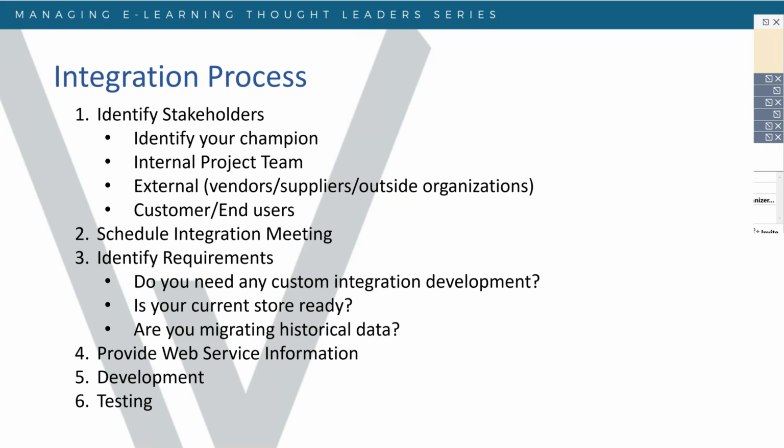So, identifying the requirements. Why is this important, Chris? This is very critical, especially for involving your AMS vendor. We understand your database and your membership processes, and there may be something on the technical side that you might not necessarily understand. So during this process, we'll identify, okay, do you need any custom integrations outside of the LMS or any custom development, such as: do you have a website, are you already logging in members to your website securely, or do we need to look at building something separately?